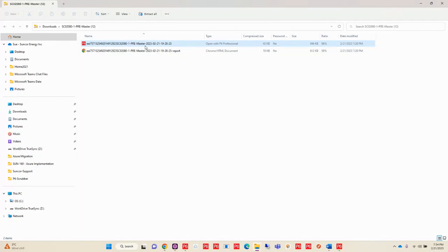First of all, I have my clean XER, the one that I scrubbed, and I can tell that because it's appended with the date and the time. And I also have an HTML copy of that report that we just looked at a moment ago. So if I wanted to take that whole report and give feedback to whomever sent me the XER or the XML, I could share the whole report, or I could copy and paste just sections of the report and give them feedback in that manner. So it gives me the opportunity to do that before I even import that into my P6 environment.